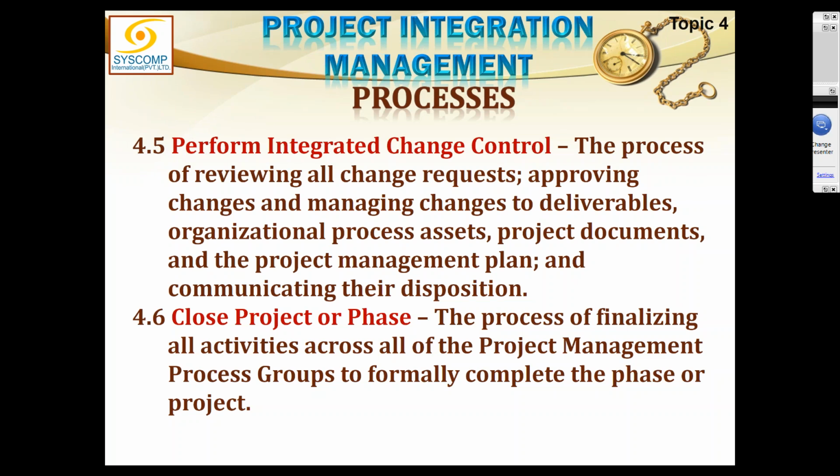We move on to the last process group, which is the closing process group. And from integration, there is only one process called close project or phase. Why phase? Because a phase is also treated as a small little project. As we have a charter for a project, to start a project, we have a charter to start a phase also. So as we close a project, we also close a phase.